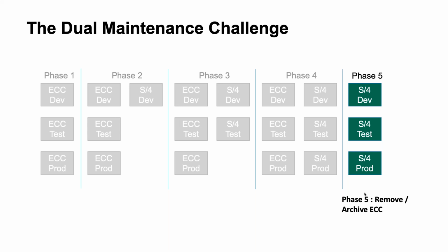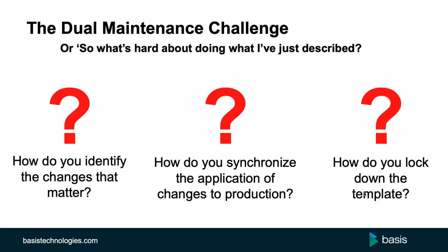And as we look at the case study, we'll see a scenario that was more the multi-year scenario. But that really poses some questions or some challenges during that transition state. And that's to do with making sure that after you've created that development system on the S4 side, that it stays in sync with changes that you're making on the ECC development system, because you're continuing to operate your business,